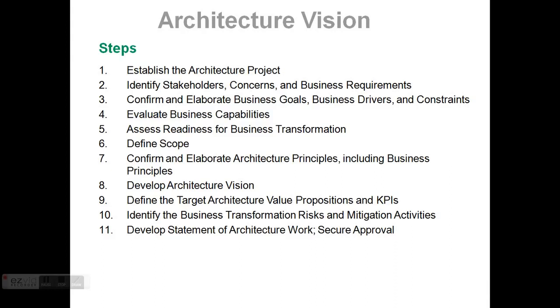At step 11, we are to develop the statement of architectural work and secure its approval. To do so, we assess the work products that are required to be produced against the set of business performance requirements.